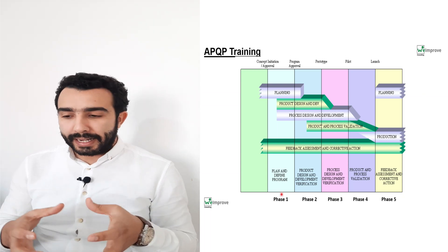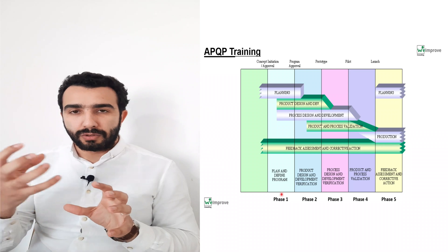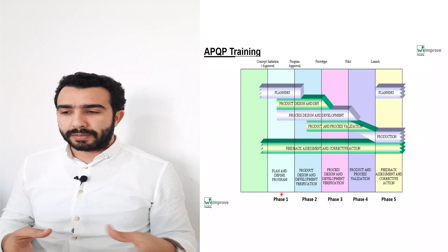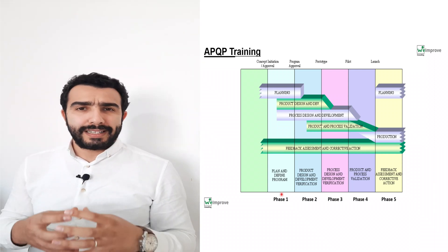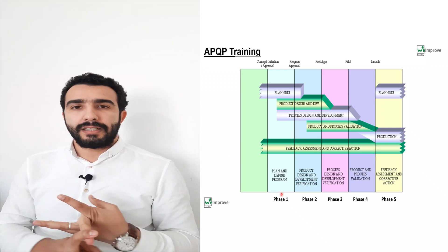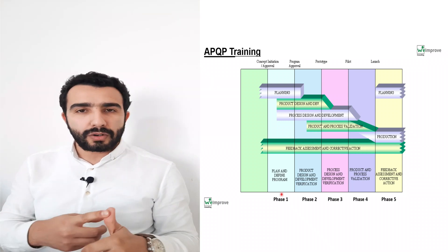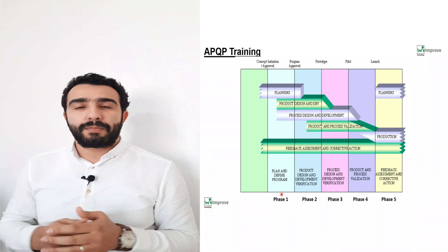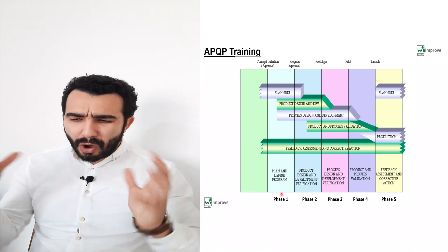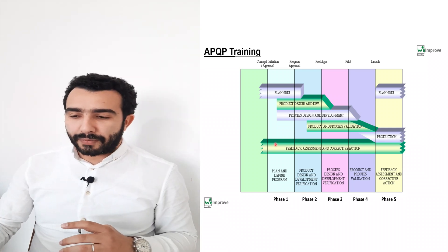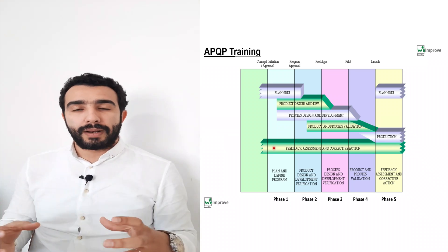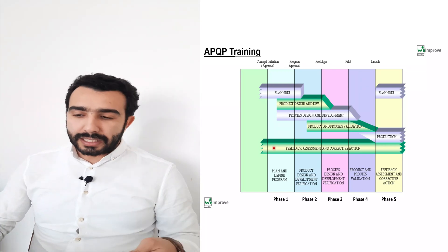Phase 1 is Planning and Definition of the Program. In this phase, you define and plan the project together with your customer — covering requirements, customer-specific requirements, risk assessments, product design, cost, and the planning schedule for when each phase should be finished. Everything related to the project should be defined in Phase 1.